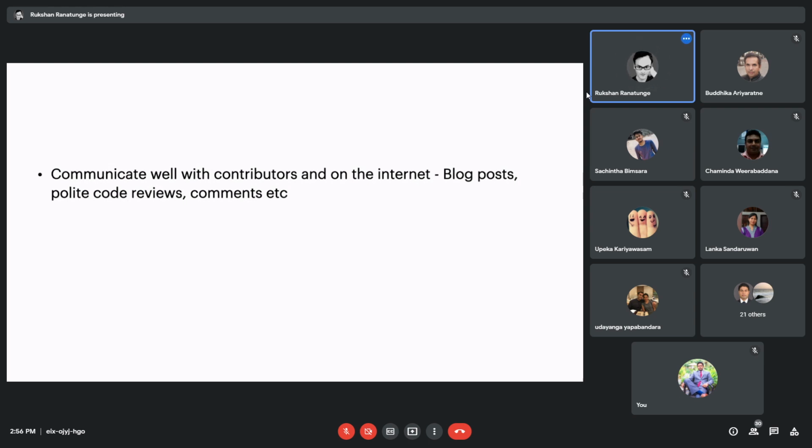And then we stopped the development of the older system. We did not add any new user requirements to the old system, and we added them only to the new system. So when we got requests asking how their user requirements were going, we said to them that it is available on the newer system, so you will be able to log into the newer system and use your user requirement.